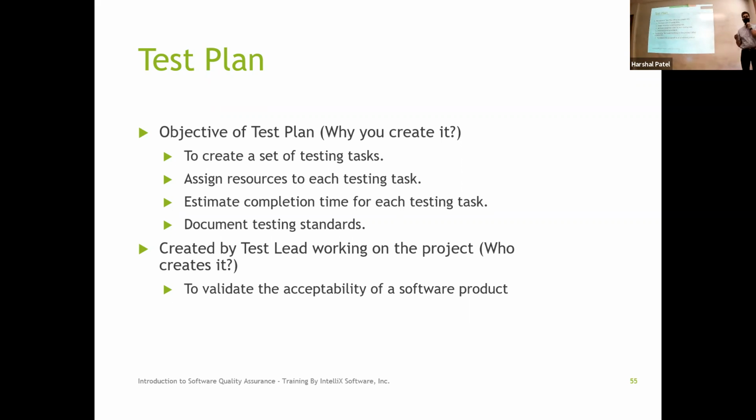When a customer says, hey, I want to build a system, right? You, as a consulting firm or an IT arm within that company, say, okay, you want to build this thing, it's going to take this much in terms of time, and this much in terms of dollar amount to build it. But how do they come up with the dollar amount, right? So the developers will go and say, if you want me to write this particular software, it's going to take this many developers, this many weeks to write.